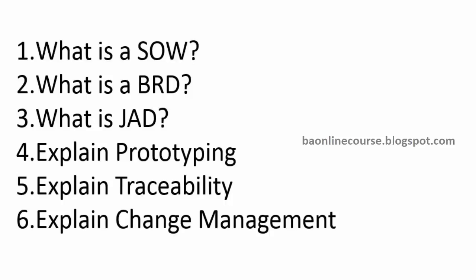See, basically, when you want to ensure that all your requirements are finally delivered, you need to track them through the various phases so that they transition to the next phase. For example, a typical project would consist of requirements, design, development, testing, and then final implementation. Now, there's a good chance that requirements could slip during any one of these phases. Traceability ensures that we are mapping them to the previous deliverables so that these slippages are avoided.